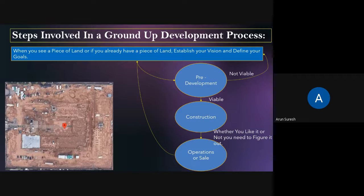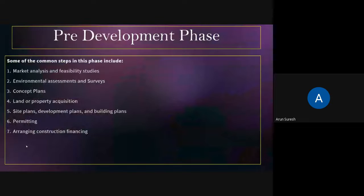Once you start construction on a project, whether we like it or not, we cannot back off at that point. You need to figure out how to either operate or sell the project. Now let's get into what encompasses the pre-development phase. There are seven steps: market analysis, feasibility studies, environmental impacts and surveys, concept plans, acquiring the piece of land, getting a detailed set of plans for bidding and securing permits, and then arranging financing for the project.